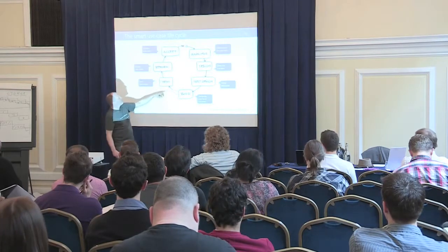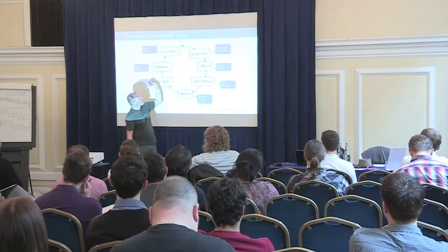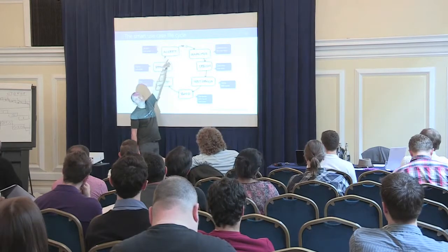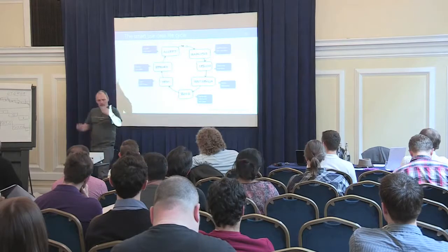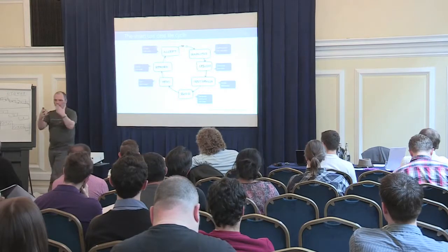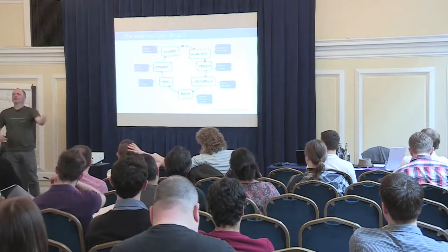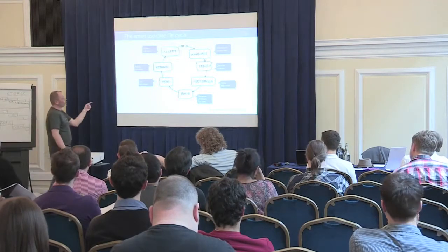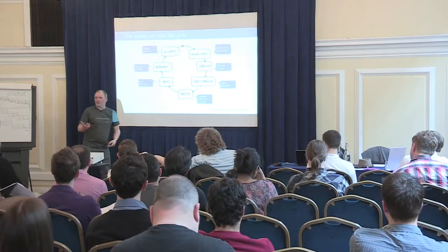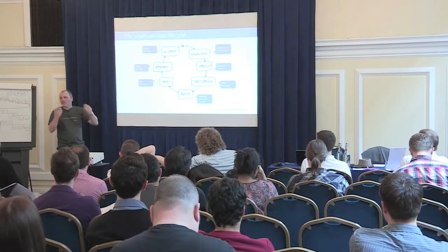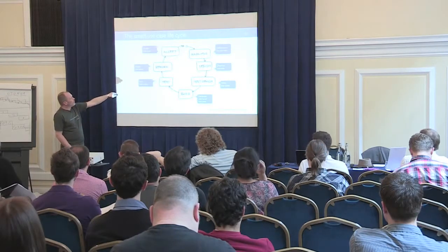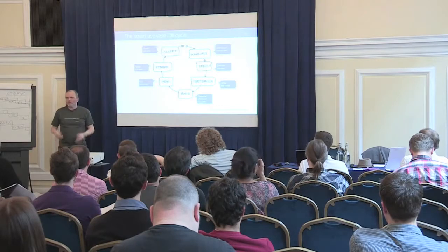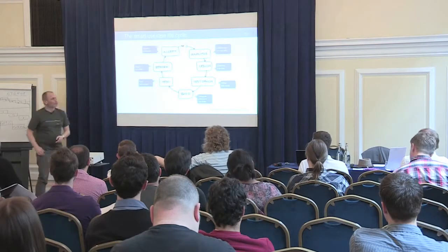And then we test it, and then sometimes it goes into rework, so it can go back into the cycle, or it goes to acceptance, and then the product owner comes in and says, okay, this is okay, I'm going to run my acceptance test, and this is okay, on to the next use case, right? So this is a life cycle. The good thing about having such a small life cycle, and you can actually do this with small use cases, well, depending on the technology you use, but you should be able to do this in about a day. Right? So we do a number of these use cases per sprint.